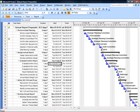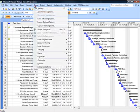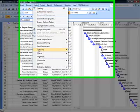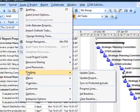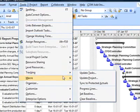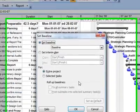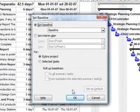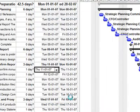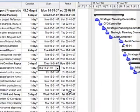Saving a baseline is actually a key step in working with project schedule. So first let's understand how a baseline can be saved. I will go to Tools, Tracking, and I will choose Set Baseline. Just click on OK. Nothing happens to the existing project file.